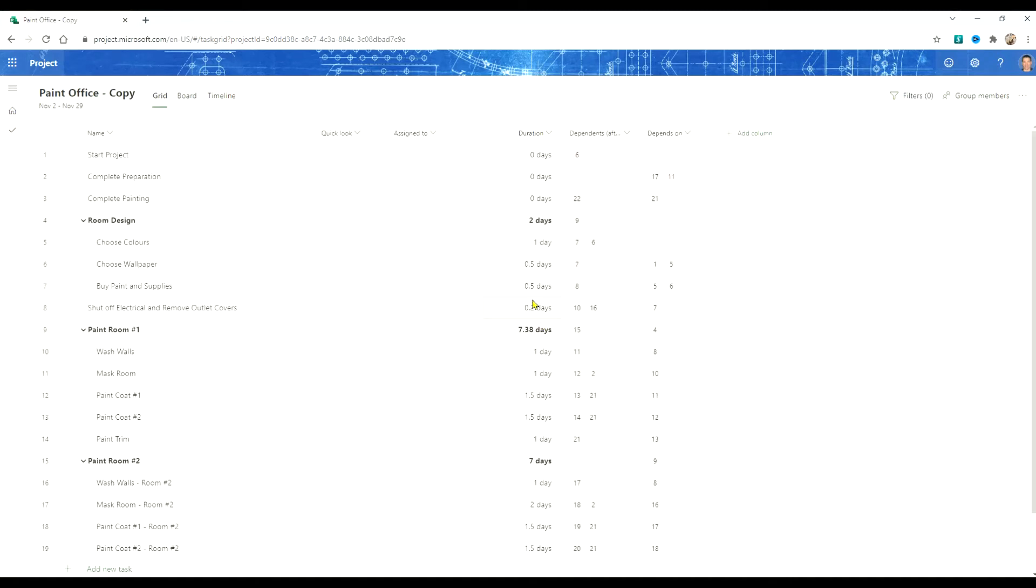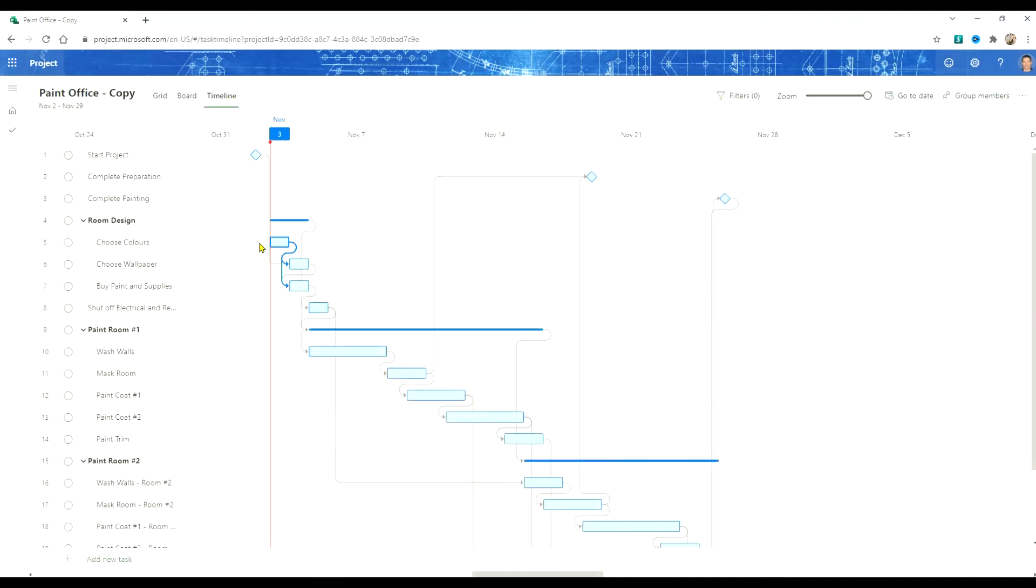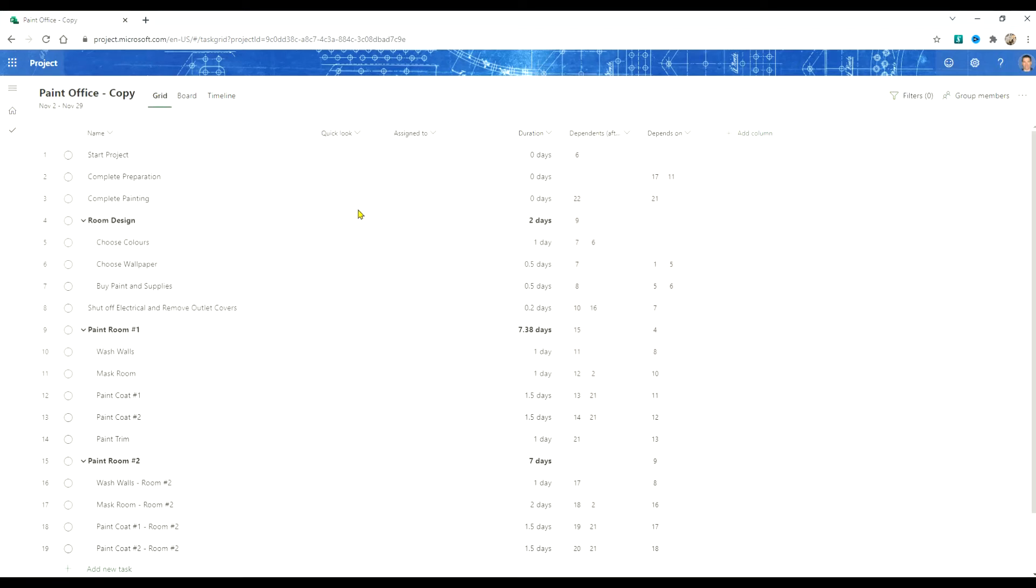This will open a copy of the schedule and we're going to use it as our new schedule and you'll see here we've brought across the work breakdown structure, the tasks, the duration and the relationships. The resources or the assignments haven't come over so this gives us a good place to start our new project.